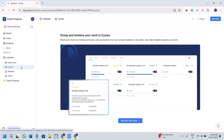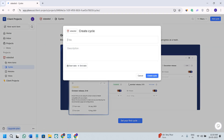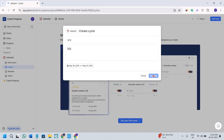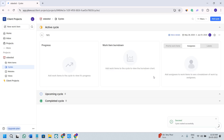If you click on the Cycles option, you can set up your first cycle. Click on the first cycle option, give it a name and a description, provide the start date and the end date, and then click on the create cycle option. This way you will be able to manage your sprints and timelines.